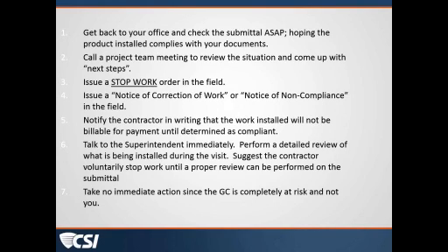and I go back to my meeting, if I have the opportunity to go through a submittal schedule, and we can agree that there are things that need to be looked at right away, and those will come, and I will commit the time to get them done. And then there are things that aren't necessarily needed right away, and they will come much later when I have more opportunity to get them reviewed, or that they be submitted and I can hold them until a certain date that I've committed to meeting, and that is acceptable to the contractor.